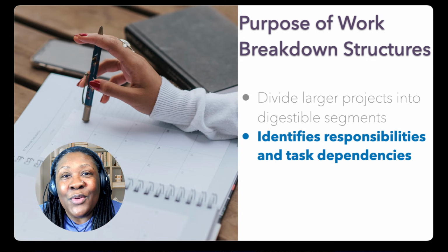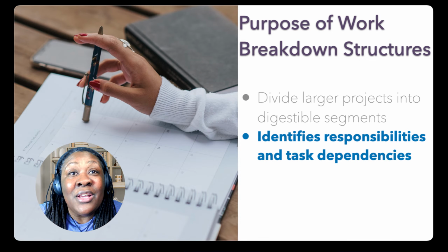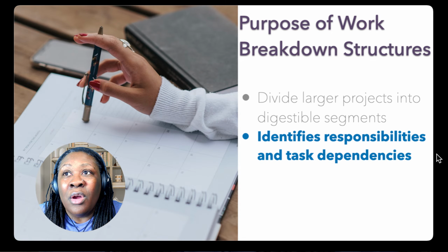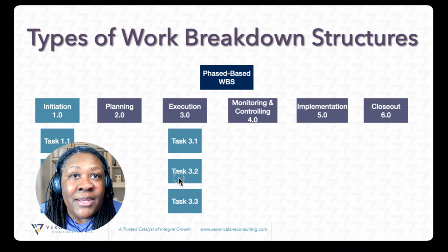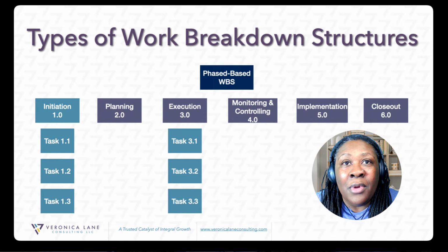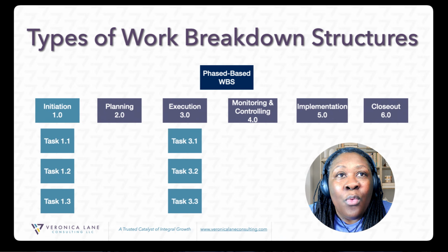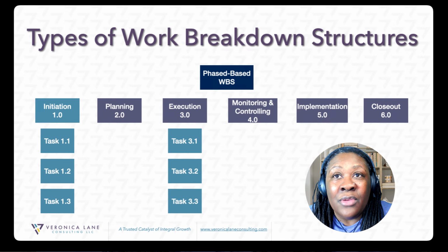Have you ever had your work breakdown structure just look like an org chart? Because it could. And if it just looks like an org chart, are there different changes that we need to make to it? Are there adjustments that have to happen? And if so, I'm going to move me over. We could use a phased based work breakdown structure.